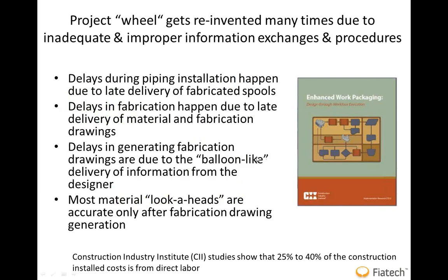Now, why is this quite important for us? If we work on any piping-intensive project, we always see that there are delays during piping installation. If you ask the installation guys, they'll tell you, look, we are not receiving the spools on time. If you go to the fabrication guys, they will tell you, look, they are not sending us the material on time.